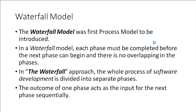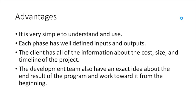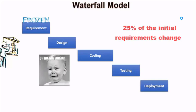In the waterfall model, it was a very simple model where each phase must be completed before the next phase can begin. There is no overlapping — the outcome of one phase acts as input for the next phase. This model was simple, with each phase having very well-defined inputs and outputs, and the client has all the information about cost, size, and timeline of the project.